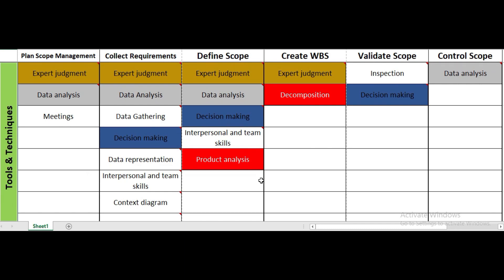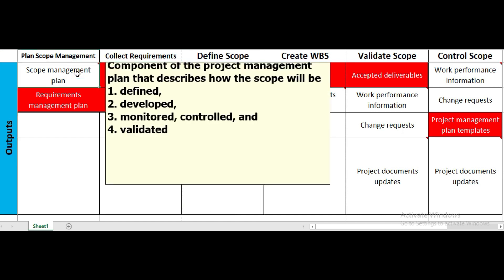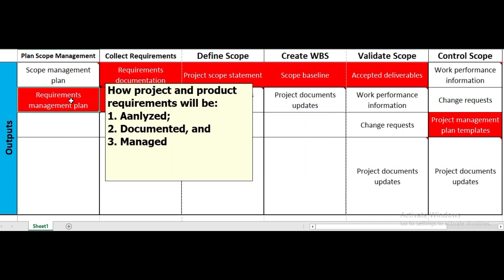Now let's look at outputs. The output of plan scope management is the scope management plan, a component of the project management plan that describes how scope will be defined, developed, monitored, controlled, and validated. The requirements management plan — shown in red as a frequently tested item — defines how project and product requirements will be analyzed, documented, and managed.